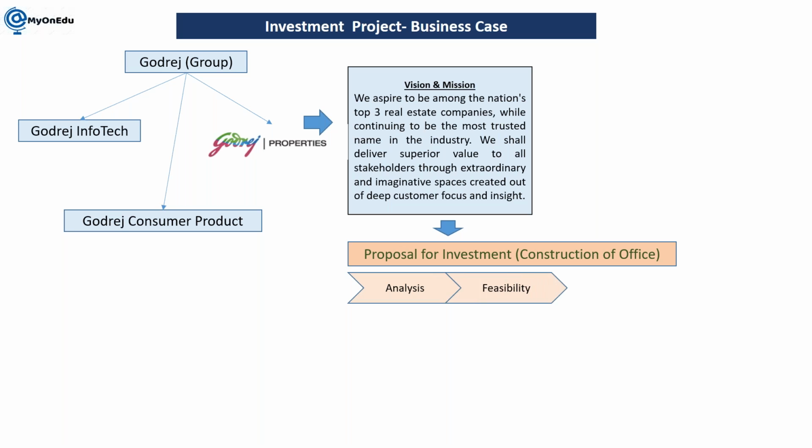Once your analysis is done, then it will go for the feasibility study. Whatever amount we are going to put into this investment, is it a good idea, or will it be beneficial for us if we put this much into this project? How much time will it take to get back that investment? If we are considering the interest rate on our investment, what will be the benefit of going for the construction? So everything needs to be analyzed in the feasibility, and once feasibility is done, it will go for approval or rejection. If it is rejected, my proposal will stop here.